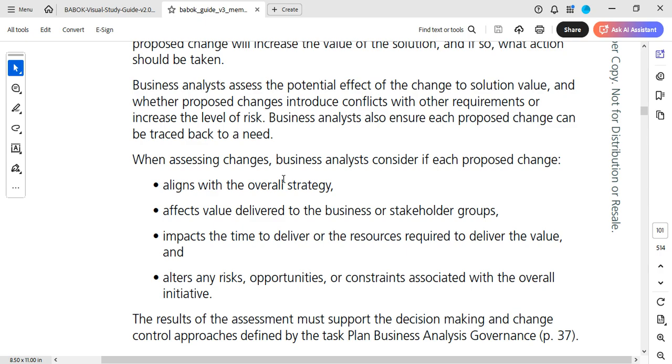For example, you are trying to introduce payment. Maybe the project is for you to advertise your product, right? That was the scope, or the website you should build for your stakeholders. And all of a sudden, your stakeholders come forward to say, oh, we also want to sell products on this platform. That means you are going to be collecting people's information. You see the risk involved.